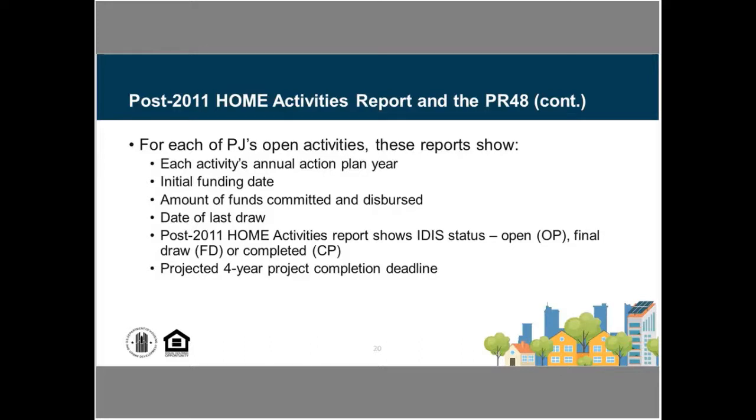It also will show whether those activities are showing within IDIS as open, in final draw, or completed. It will also list what the projected project completion deadline would be. It's projected because compliance is based on the actual date of the fully executed written agreement, so this is a placeholder based on the fund date within IDIS.